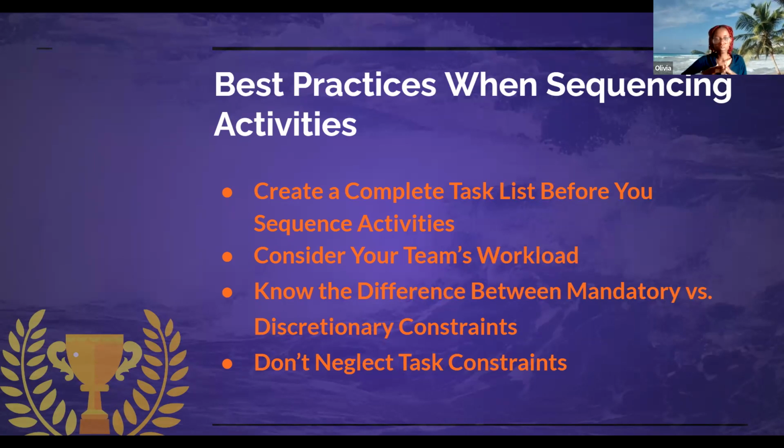The best way to begin sequencing your activities is to work with all the information you have at the time. Even if you know a task would probably produce more tasks down the road, you really need to factor those into your task list. Sequencing activities begins as the best possible rough draft that you can clean up along the way.